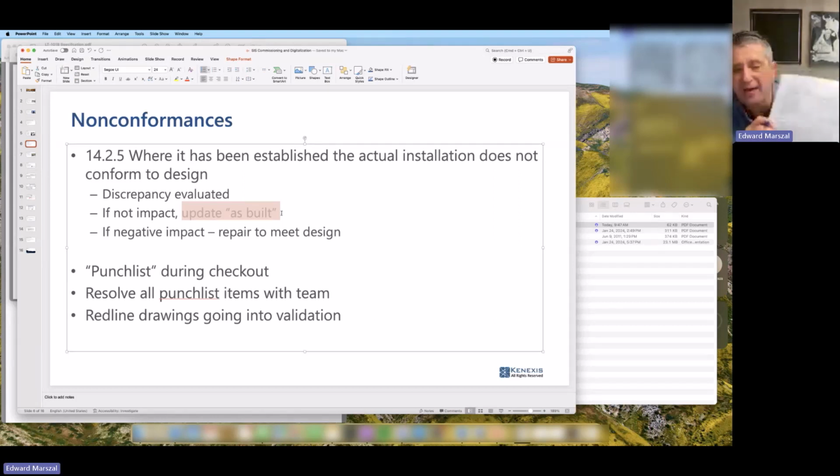So there's a management issue that we're going to need to get into to make sure that these action items get resolved before the plant gets put into operation. How do you do that? Well, let me show you the state of the art. Are you ready for this? A red sticker. So I'm going to go into my pile of stickers, and I'm going to take this red sticker and put it on my folder, and that tells me that this is bad. And I'm going to take this folder and put it in the pile that needs rework.